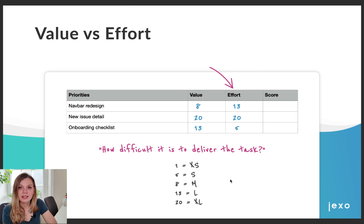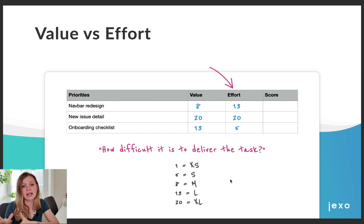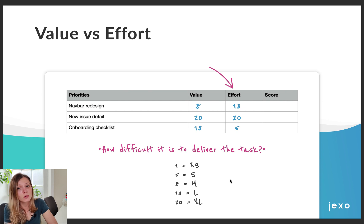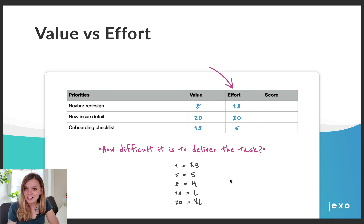The next metric is effort. Here you need to evaluate how difficult it is to deliver the task. Make sure you include the effort of everyone involved in the process — from research, design, development, testing, and even marketing. We tend to underestimate how much something will take, especially when only development effort is included. Some UI changes might be quick to build but can have a big impact on documentation you didn't even think of. We like to use t-shirt size estimation so people don't feel committed to specific timelines.